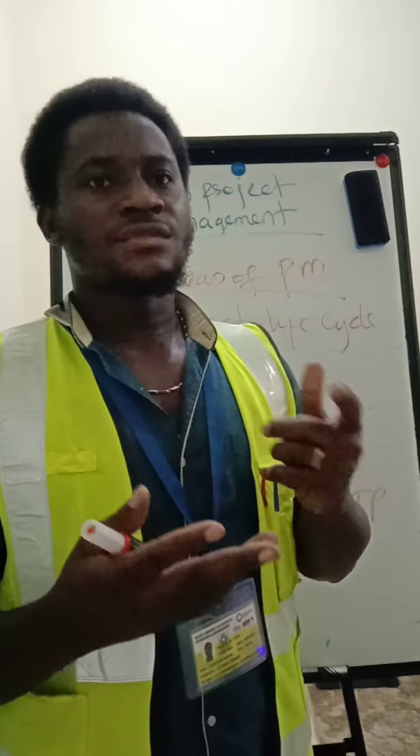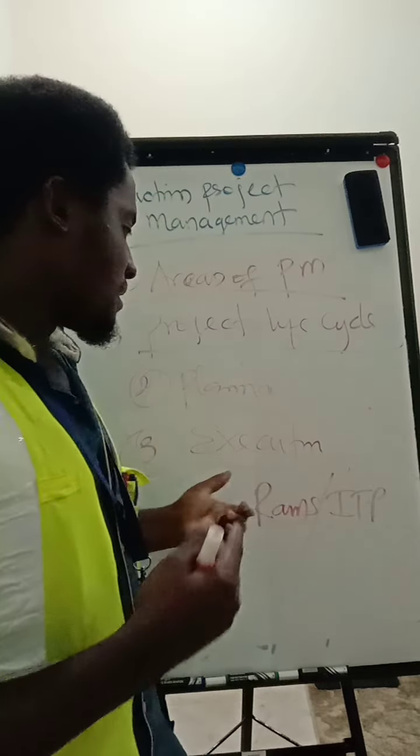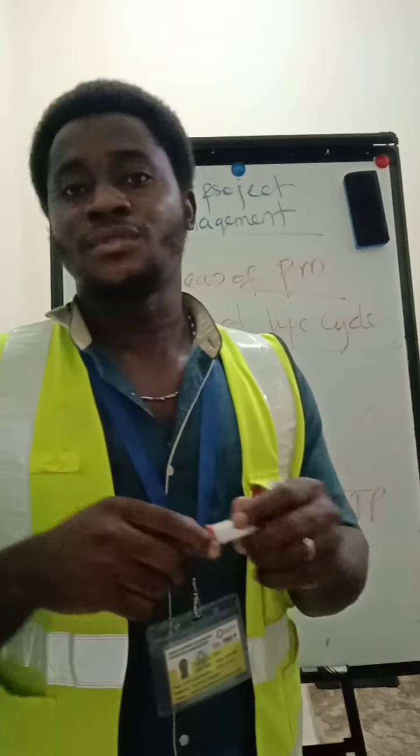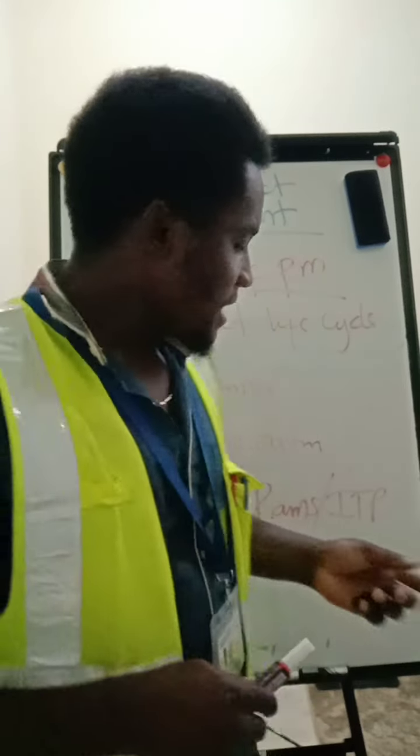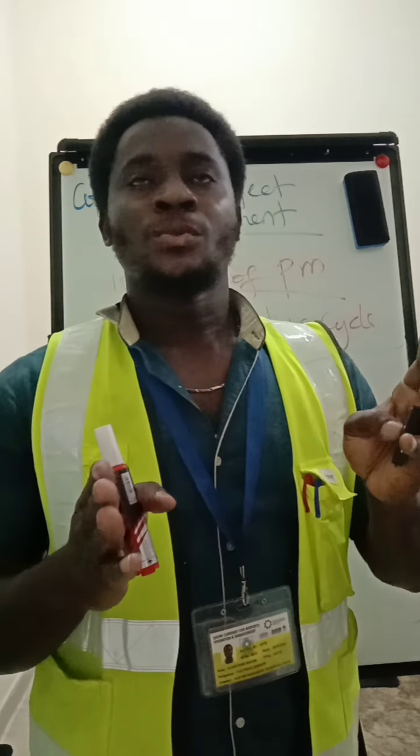So all these different punch lists or the different snag lists, we have to rectify them back on site, raise an inspection, submit, get approval before we can move to the next step. So the next now will be the NCR. NCR now will be the same comments, or probably I'll explain the comments might be, we might have the